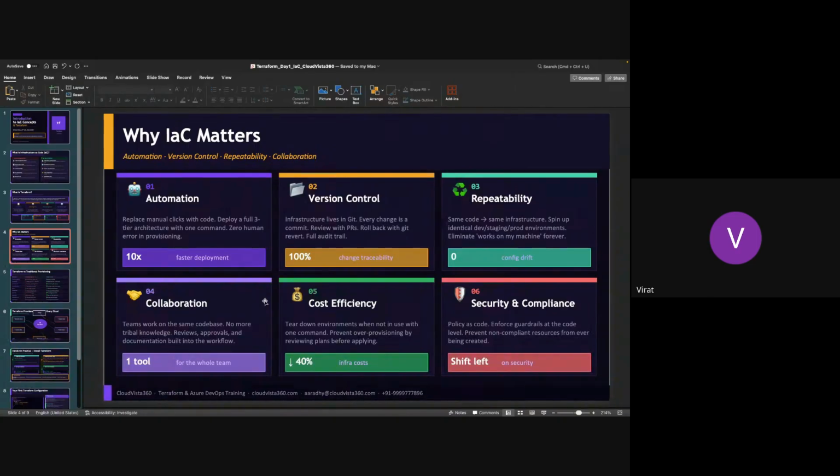To get a near date of what time it will take to complete, we play a planning poker game. If you are saying it will take 10 days, it means it will take 80 hours to complete. If you are giving a timeline of 80 hours to complete a storage account module, planning poker means everyone in your team will give a time. Like you say 80 hours, someone will say 100 hours, someone will say 20 hours.